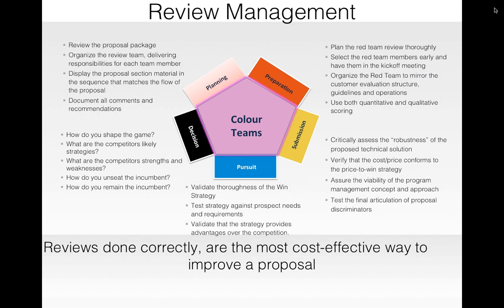The gold team review checks the robustness of the entire proposal, not only the technical solution but also the implementation methodology, the governance plan, and the way you will do the transitioning. All these are identified and reviewed in the gold team review, and anything which is not of value to the customer or is a risk to your business is eliminated.